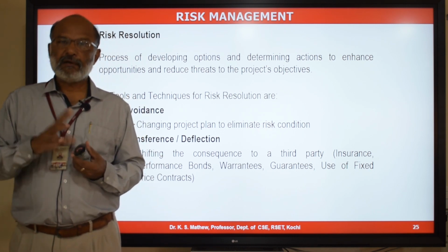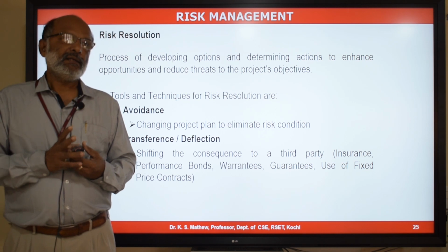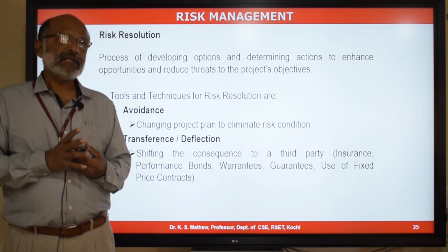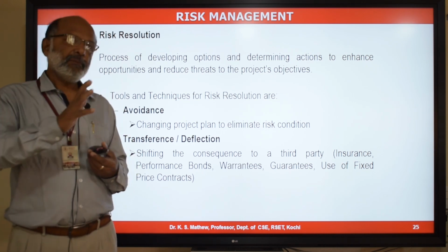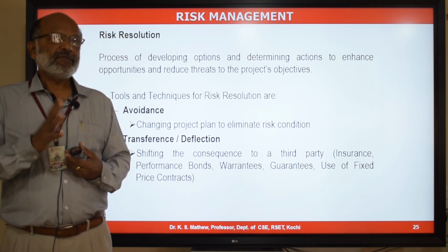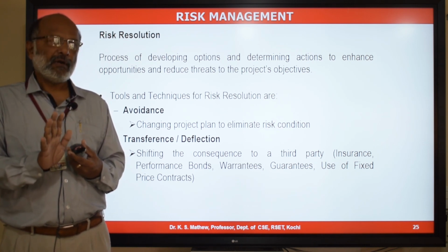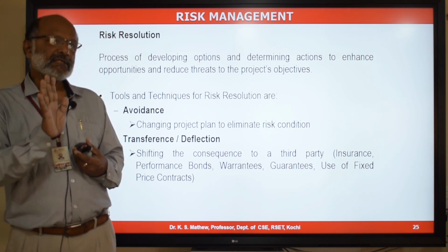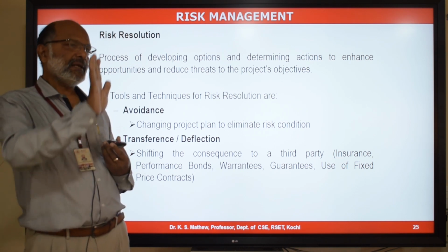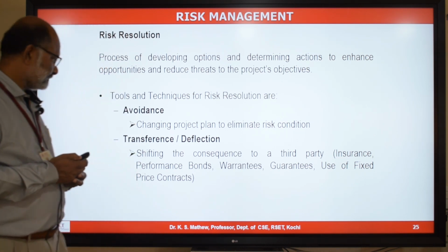When you use a fixed price contract, the customer has to pay the supplier a fixed amount. Even if the project cost exceeds, the customer is not worried about that. It's a fixed price contract. So actually, the risk of overrunning the price or the cost, the customer is transferring that risk to the supplier by signing a fixed price contract.